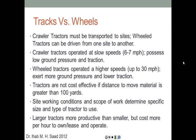The decision to use tracks or wheels depends on use and availability. Crawler tractors must be transported to sites — they cannot be driven on public highways as they would damage asphalt — whereas wheel tractors can be driven from one site to another. Crawler tractors operate at slow speeds of six to seven miles per hour, with low ground pressure and high traction. Wheel tractors operate at high speeds up to thirty miles per hour but exert more ground pressure and have lower traction. On muddy soil, a crawler tractor distributes weight as a line load across the tracks, whereas a wheel tractor concentrates it as a point load under the tires.